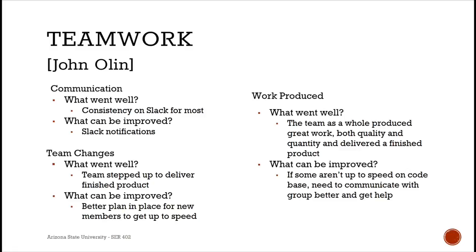We had some team personnel changes from first to second semester, which was tough, with 2 members leaving and 2 being added. I was proud of our team that we were able to adjust to that and step up and deliver a finished product that met our sponsors' needs. In the future, I believe we need a better plan to get new members up to speed. It was a big adjustment for some of them, coming into a new code base with a new language they've never used before, and that probably affected us later on.